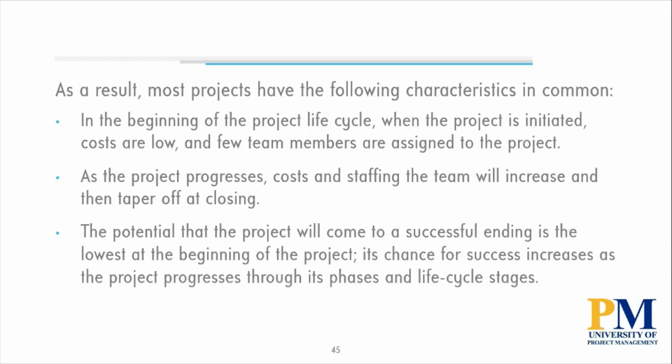In the beginning of the project, there's not much going on, not a lot of money's been spent, not a lot of people are hired. As the project progresses, cost and staffing levels go up. The majority of the project money and resources is going to be spent in execution, and the potential that the project will come to a successful ending is the lowest at the beginning of the project.